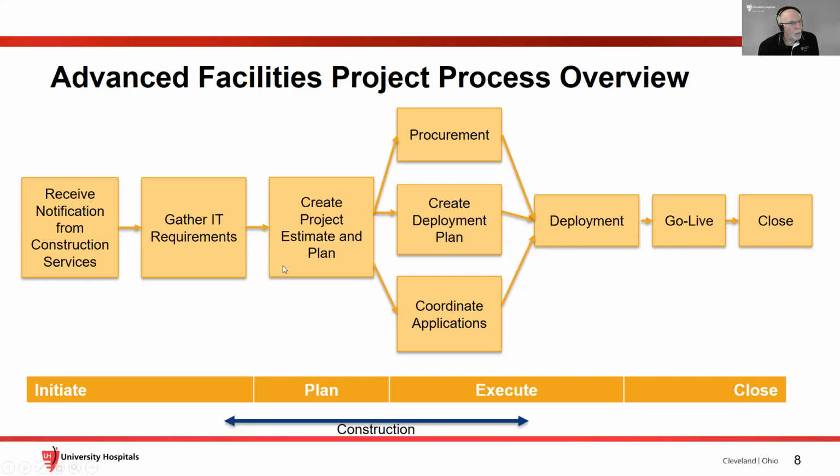All right. Once we have created our plan, we can move on to procurement. And this is an interesting subject these days. Everybody knows that the supply chain is in an uproar and things are a long lead time, and they are. We had to wait 6 months for certain components to arrive for the Avon facility, and there are still a couple of them that are outstanding. Video cards. Video cards are a big one.